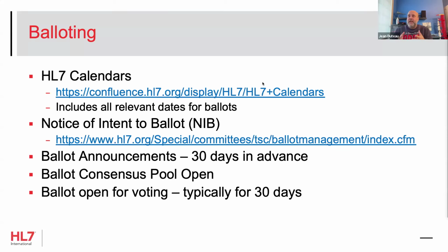So be helpful with your projects, but at the same time, they have to come to us and say, hey, we're ready to go. We have material to present to you. And normally they give us 7 days or 10 days or 2 weeks, whatever it is, depending on how big the guide is, to allow the work group to look at it. And what we're looking at in that case is not, is this wrong? Because that's what the ballot's for, but does it have the proper quality? Does it meet the requirements that we think it needs to be able to go to ballot?